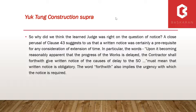Given that that is the position under the JKR form of contract, it will certainly be the position under the PAM form of contract. The courts appear ready and willing to enforce the condition precedent provisions in extension of time clauses, so insofar as contractors are concerned, it is very important to be aware of these provisions and to comply with them.